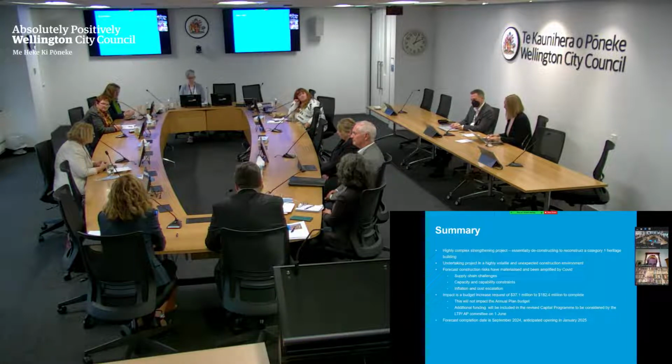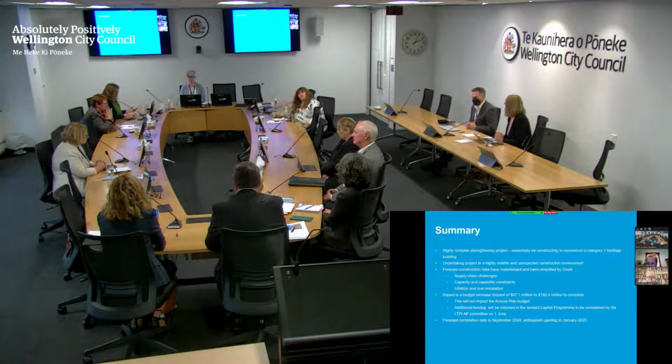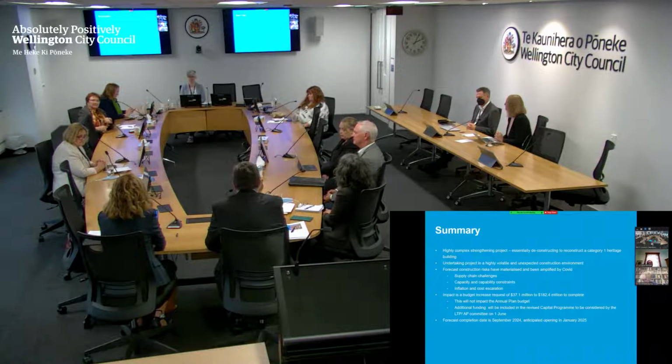In terms of the impact of this budget request, it isn't going to impact on your annual plan budget in the coming year. These are costs that are going to apply in the following 2 years and will need to be recognised in your longer term financial plan and in the phasing and refocusing of our capital works program. And this is advice that we will bring to you through the annual plan LTP committee and then on via a recommendation from that committee to the council. And of course that meeting is on the 1st of June.